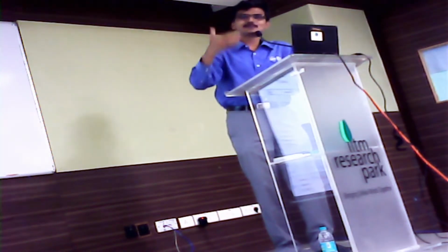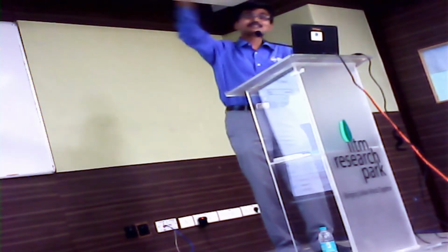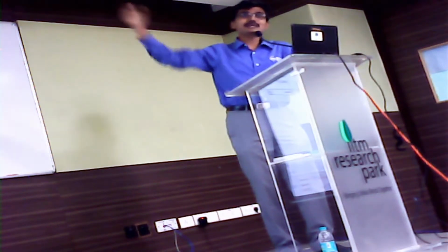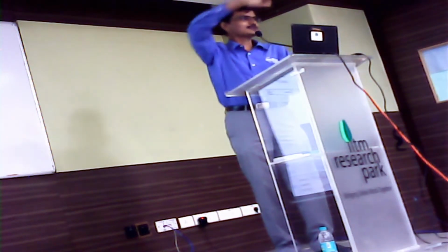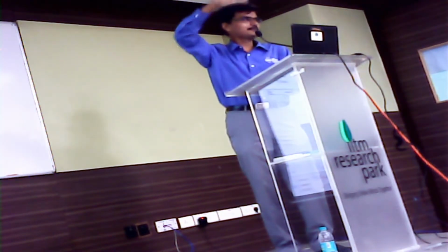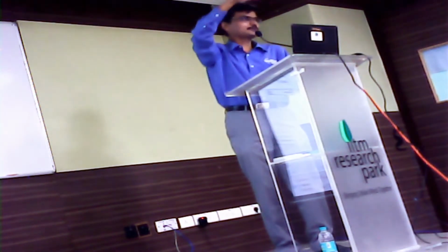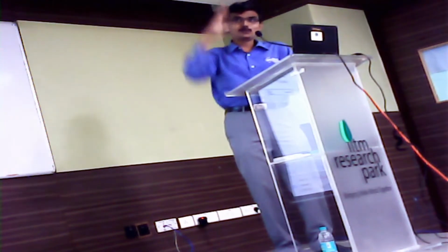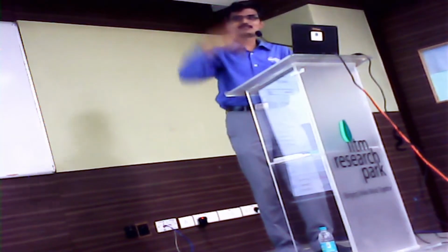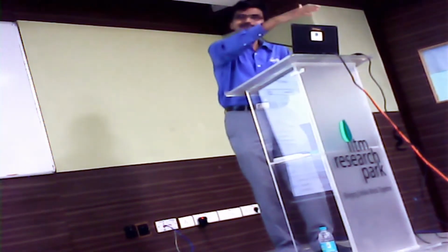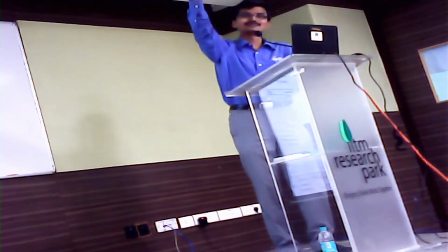Let's say in this example, we have a team in Chennai and Coimbatore. If I say at a project calendar level it is Coimbatore, all tasks by default will be scheduled as per Coimbatore working time. So is everyone having an idea about what that project calendar is? Please note, I may not be able to give a demo of it, but at least the concept you need to understand. Now, the moment I assign a team member to a task, Durai or myself or him, as per his working time, the task is now getting scheduled. Which means resource calendar will override at a project level.